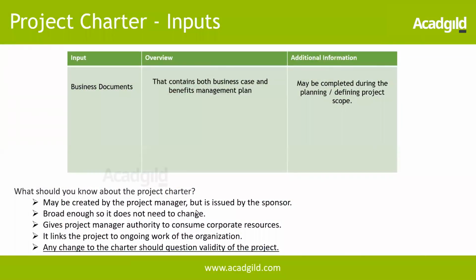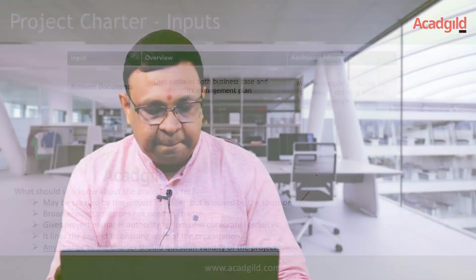An additional thing we need to know about this project charter is that it may be created by the project manager. We saw that the project charter identifies the project manager, but sometimes you may have seen in organizations that project managers are identified first, even before the kickoff, right? So in that case, who develops this project charter? The project manager may develop a project charter, but of course it will be approved by the project sponsor.